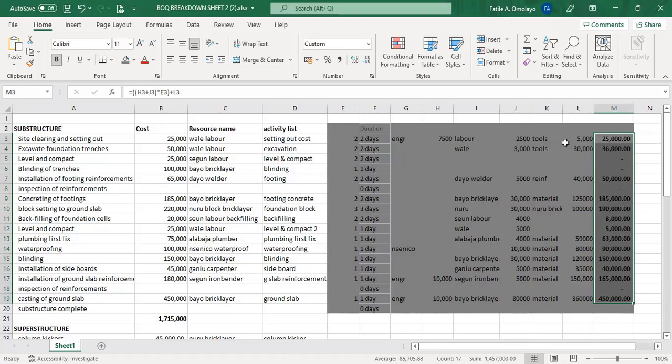I've split them. Under the resource sheet, we have work resource, which are personnel and equipment; material resource, which are consumables; and cost resource, which are those costs that are not directly related to the task, like administrative costs, charges, overhead, transportation, and the likes.